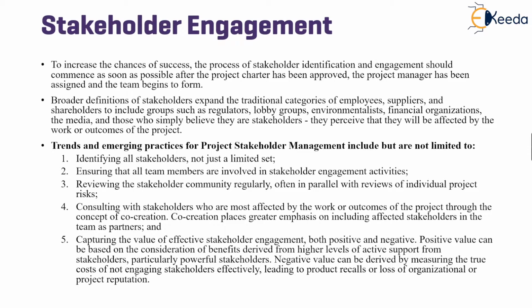Coming to understand what stakeholder engagement actually means. In order to increase the chances of success of any project, the process of stakeholder identification and engagement should commence as soon as possible, after the project charter has been approved, the project manager assigned, and the team begins to form. This should be the primary focus.